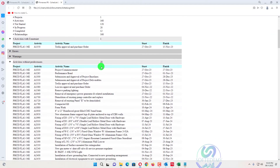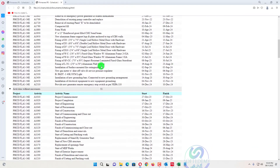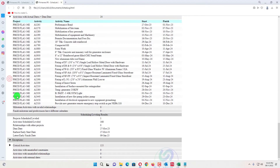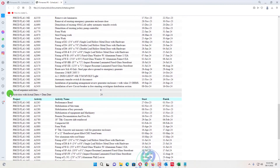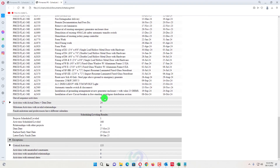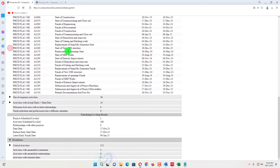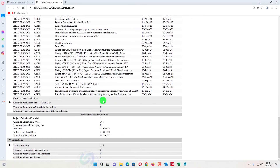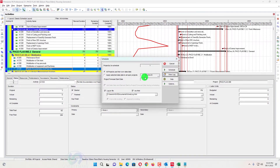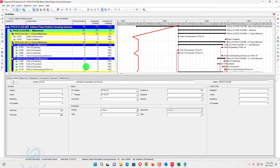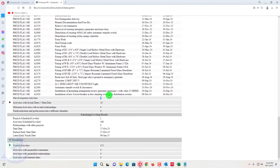Now schedule the project and view the log. When we view the log, you can see that out-of-sequence activities are now 0. Before, there were 36 — now there are 0. There are some minor info errors in the log, but all out-of-sequence activities have been removed. In the detail view there are 0 out-of-sequence activities left.